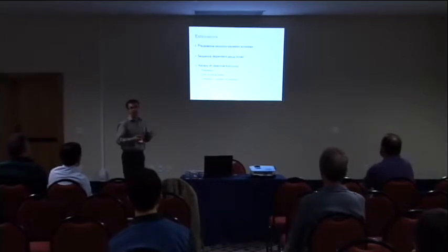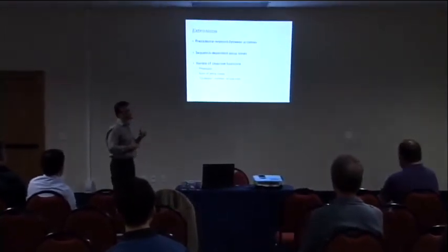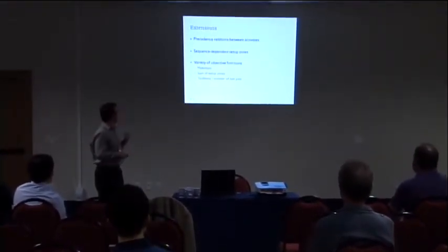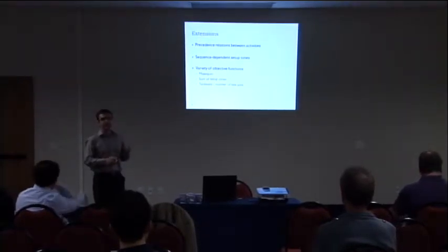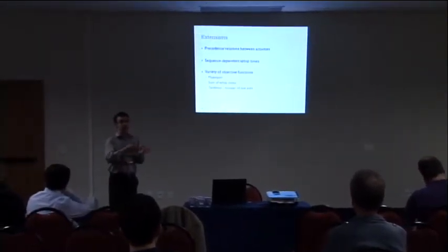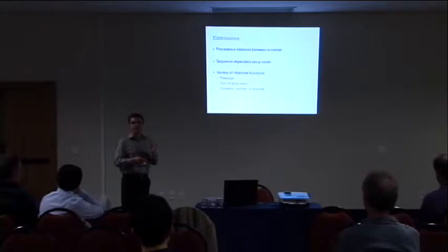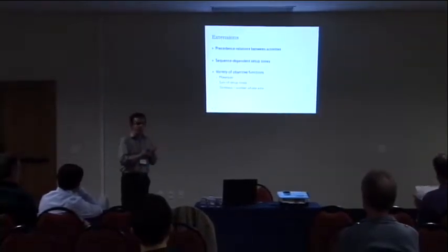Okay? And we have several extensions of this model. We may impose precedence relations between activities. You may have sequence-dependent setup times. So between the end of an activity and the beginning of the next one, some time must elapse, which may be dependent on the pair of activities.